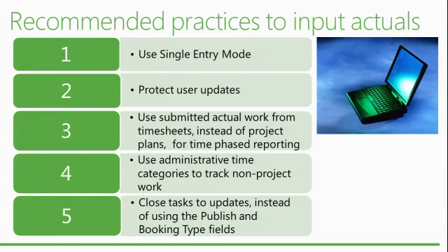Another option is to also set these admin times as automatically approved or not. So it's a setting that you can put there to push the approval automatically and basically avoid approval. For example, vacation: when you log your time, it's already done and it's too late usually. Or sick time, you're not going to reject sick time if somebody reported it after the fact.